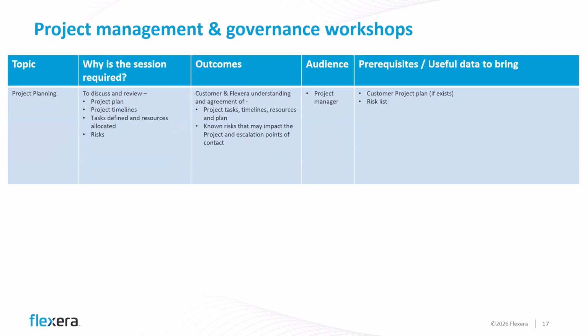Project management and governance workshops focus on reviewing the project plan, timelines, defined tasks, resource allocation, and risk management. Both the customer and Flexera align on project tasks, escalation points, and risk mitigation strategies. So, delivery stays predictable.